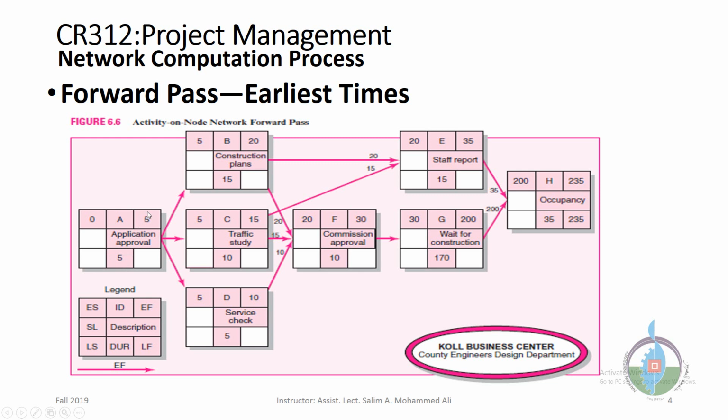Next, as you can see, each activity has its duration. This is already written by the planning team because it should have its duration time. It's pre-designed for this. Okay. After A is a burst activity. Why is it a burst activity? Because there are 3 arrows, more than 1 arrow, flowing from it.